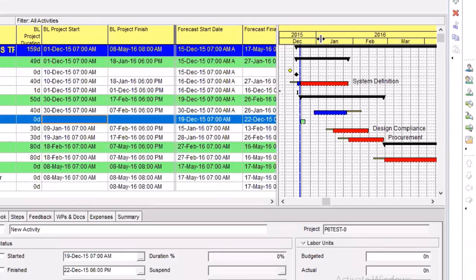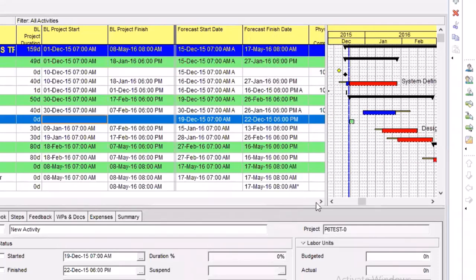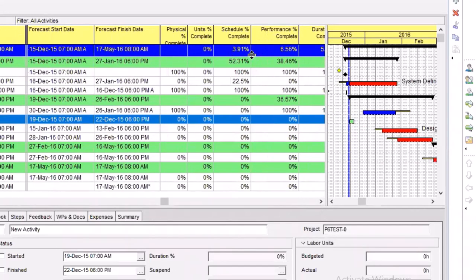So irrespective, sometimes your percentage complete can be looking good, right? The percentage complete can be looking good, but here, so like when we look at this percentage complete now, see here, this and this, your percentage complete is looking good, fantastic. Do you know why? It was because of this activity that we did on time, this particular one. That is why this actual is looking 6.5 over 3.91. I'm doing well.